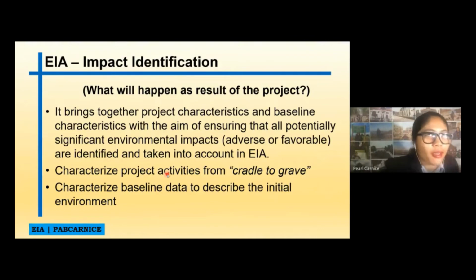And then characterize baseline data to describe the initial environment. Because of course it will be hard to predict the impact if we do not know exactly what is the initial environmental status of the area that we will be doing our project, in which again that is why the baseline data is very important with your EIS study, because it will be the reference point of your impact predictions. At the same time, there is actually no such thing as an EIA study or EIS document that has no baseline studies or information, because again, that is the reference point.